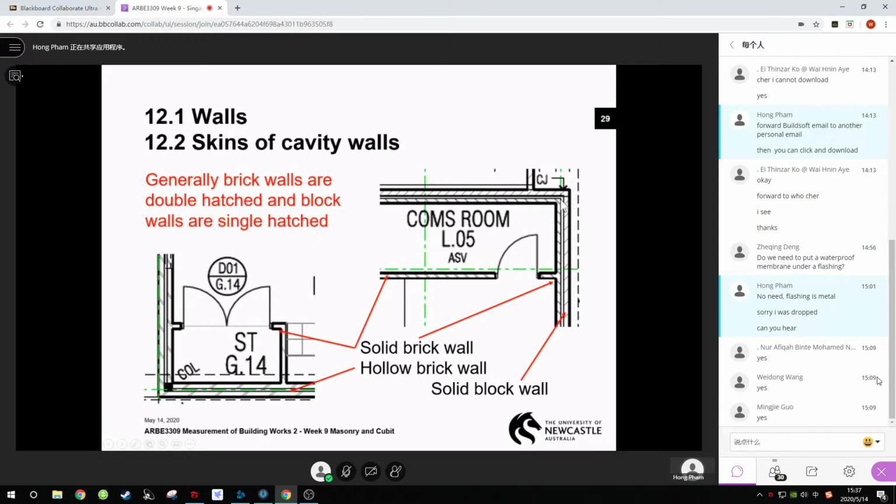A really common occurrence for a composite wall is if you've got a blockwork retaining wall, filled concrete block retaining wall, then you'll have a cavity to let the seepage come down, then you might build a skin on front of that. So that's a 110 skin on hollow composite wall. In other words, it's a brick skin built on your cavity onto a retaining wall.